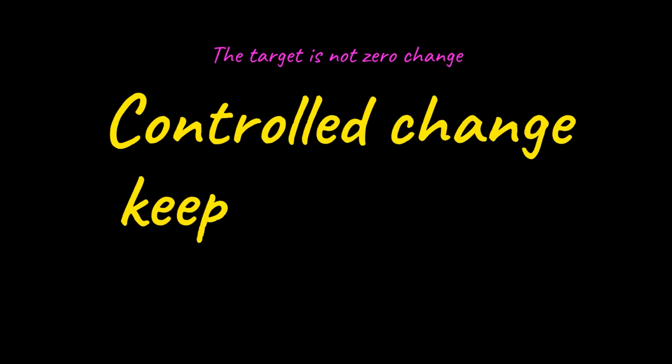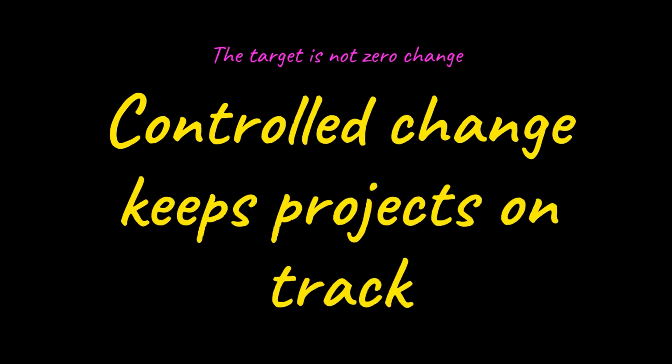The goal is never to eliminate change entirely. That's unrealistic. The goal is to ensure every change goes through a defined process. When additions bypass that process, you get the telltale symptoms: timeline slip and budget overrun.